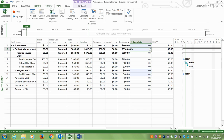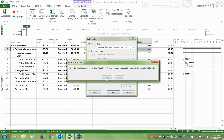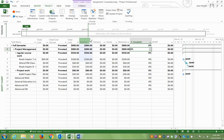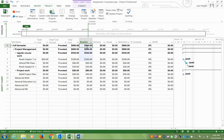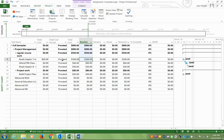So to do that, I'm going to go Project, Set Baseline. Okay. So what this does is, the baseline again, that is a snapshot in time. At the start of the second half of the semester, here's what I felt I planned to invest in my education, $890. Yours is probably going to be $6,000 or $10,000 or something like that.